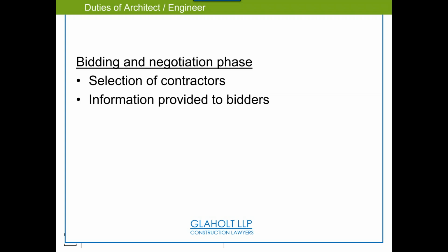There's a fairness rule, and the gist of it is this. I give person X my information to bid on, and then 2 days later, person Y says to me, hey, I know you have a model. Can I check that out? And I give person Y the model. Person Y now has an advantage over person X. This person Y can query the model and do who knows what. Person X wasn't given that opportunity, therefore it's not fair, therefore it's against the law.